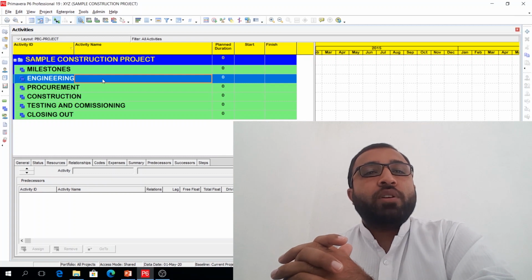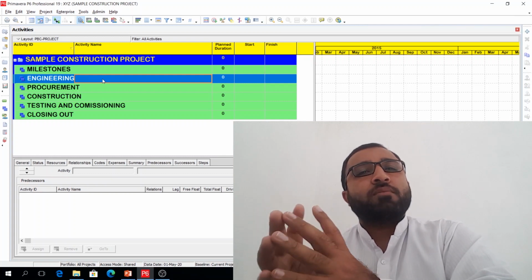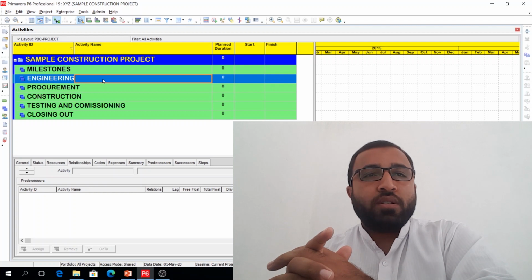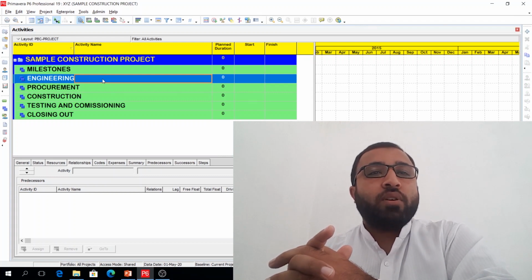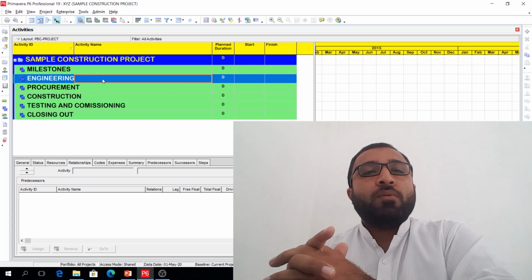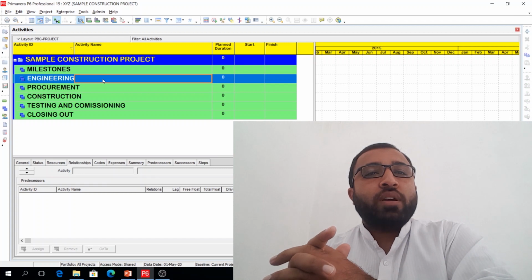After the purchase order is issued, they will take some time to deliver that material on the site. All these steps take some duration, some time. We need to plan accordingly, what time they will take for the quotation and agreement, then for the purchase order or PO issue, and then delivery to the site.